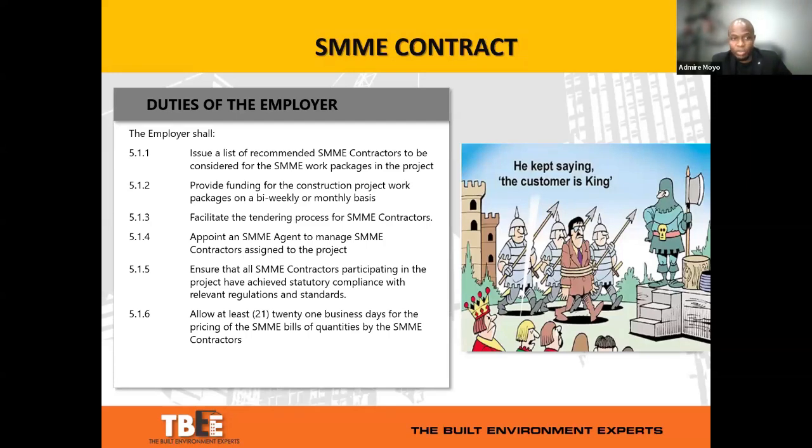The client has a duty to appoint an SMME agent to manage the SMME contractors as well. Again, that is optional. The client can choose very well to say, well, they've got the capacity within their own resource team to actually execute that function. So that's fine. It is not imposing on the client to say they must always outsource that function. But the key aspect here is to say, in the rolling out of the project, someone specifically then accepts that role and responsibility as SMME agent.